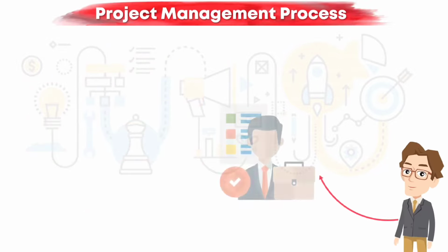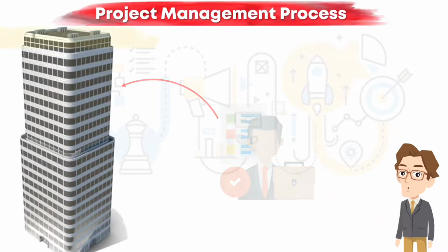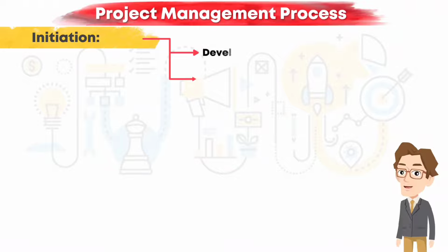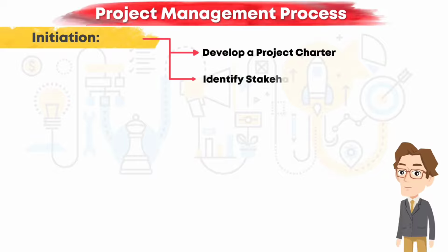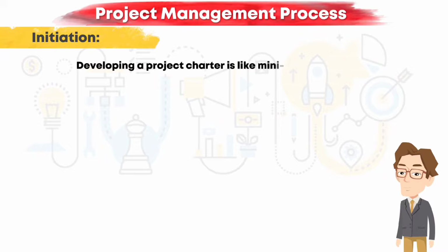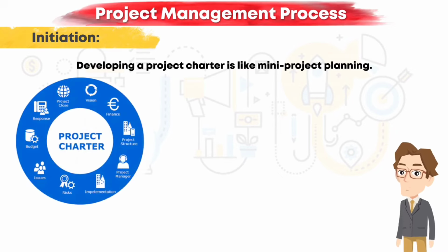Suppose I am a project manager and my project is to build a skyscraper. For the initiation process group, I have 2 important processes. First, develop a project charter, and second is to identify stakeholders. Developing a project charter is like mini project planning. It's a clarification of why you're doing this.